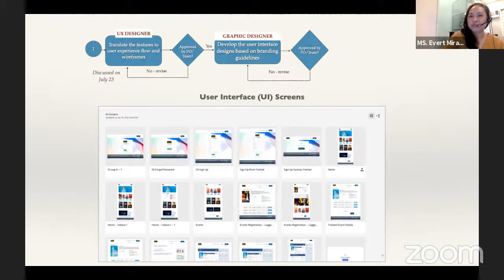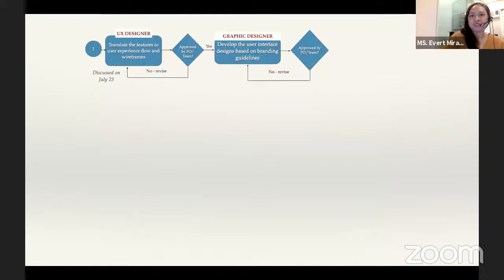Okay. And then once it's approved, that's the time we can start the development. So please be sure you're ready before the development, especially if you're paying a consultant, because it's going to delay the project, and they might charge you in between because you asked them to start and then you change things in the middle. They call it a change request. In our team, we also call it scope creep. Changing, changing, changing, no? So it has to be established first before you kick off the development.